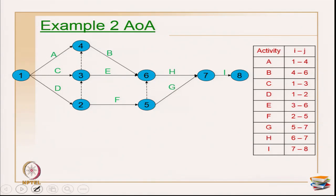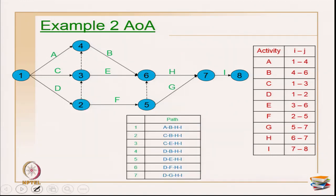Once the final network is arrived at, numbering happens: 1, 2, 3, 4, then 5 and 6 because I should always be less than J, then 7 and 8. There are 7 paths in this network: A-B-H-I, C-dummy-B-H-I, C-E-H-I, D-B-H-I, D-E-H-I, D-F-H-I, and D-F-G-I. Now the key question is which is the critical path and what is the duration for all these paths.